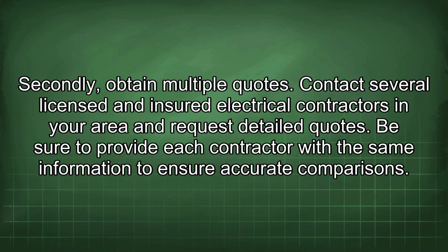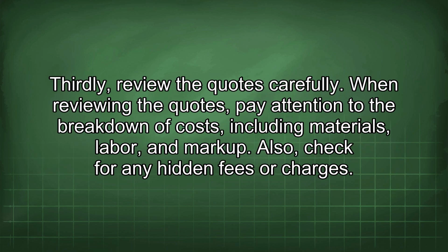Contact several licensed and insured electrical contractors in your area and request detailed quotes. Be sure to provide each contractor with the same information to ensure accurate comparisons. Thirdly, review the quotes carefully. When reviewing the quotes, pay attention to the breakdown of costs, including materials, labor, and markup. Also, check for any hidden fees or charges.